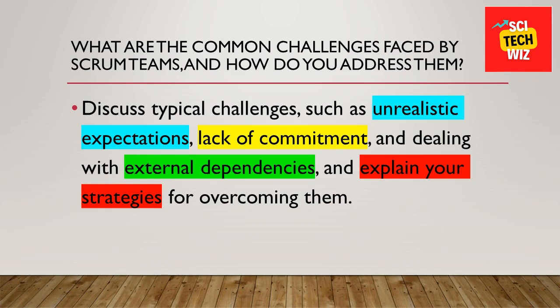For example, external dependency. If I'm a Scrum Master, I try to note down the external dependencies at the beginning of the project, or I proactively concentrate on finding the external dependencies, who are third parties. Which third-party software are we using in our project? I find it in advance and I try to talk to that third party and get the software ready so that we will not have conflicts in handling the external dependencies. So you try to answer all these things.